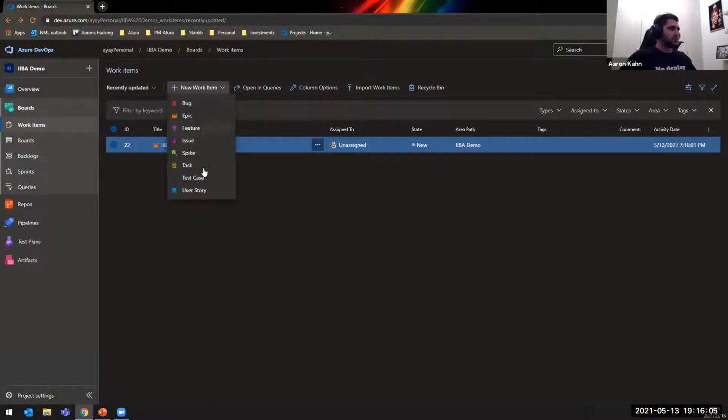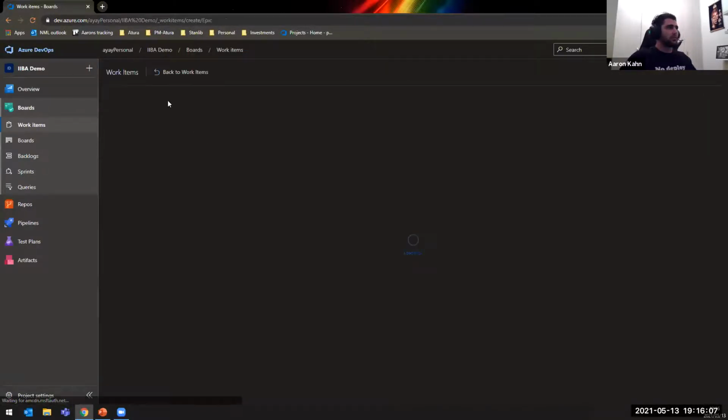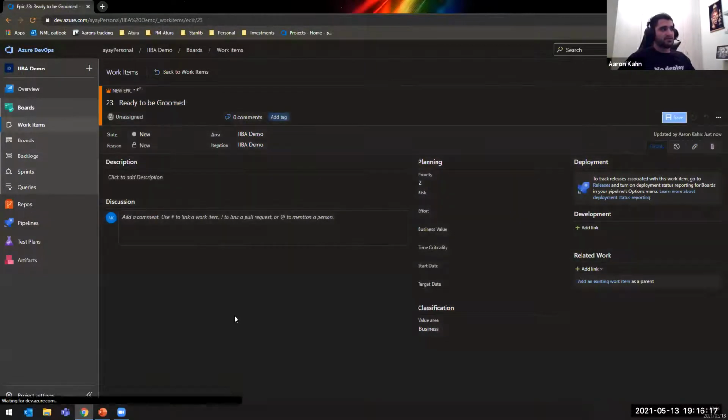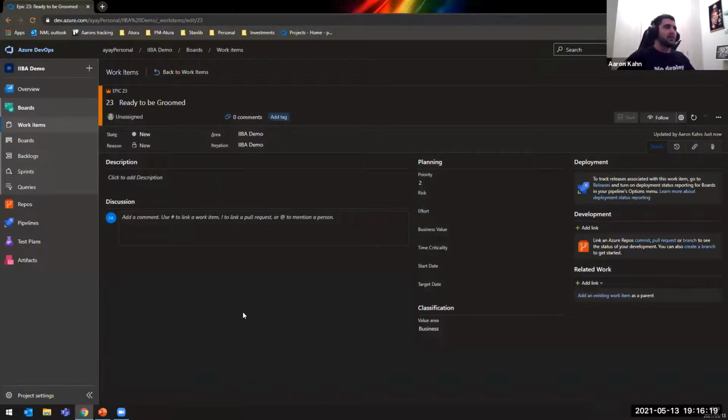It's great. I'm going to create another epic now that I call ready to be groomed. The reason I have created this epic is I have found backlogs get very messy sometimes. What is very nice is that my team knows, anytime they create a story that's going to go into a future backlog grooming, or I myself do it, and the story is not ready, we go ahead and on the side here, we relate this ready to be groomed epic.